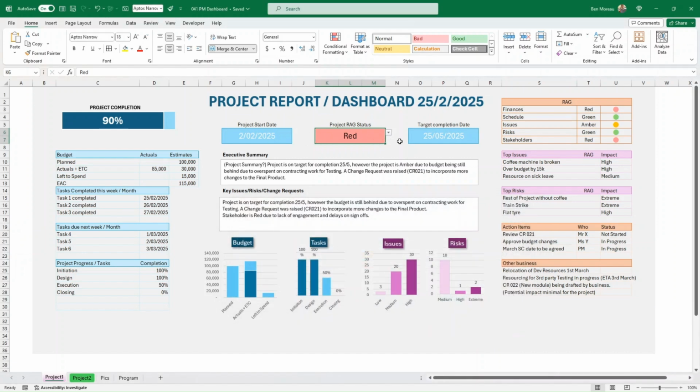So this is the key thing. This is the stuff on the top. I mentioned in the intro that questions will arise, especially if it's a red. So here it would be more accurate maybe to have it amber. So you would have an executive asking you, so why is it amber? And then you would jump onto this part here, the RAG breakdown of all the RAGs for each area. So here I've just put 5 areas, but you can put as many areas as you like.